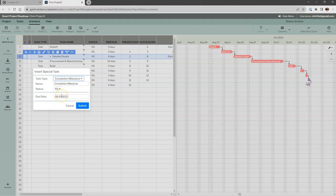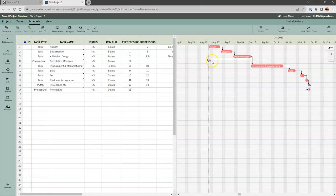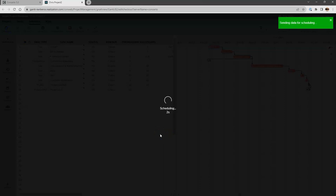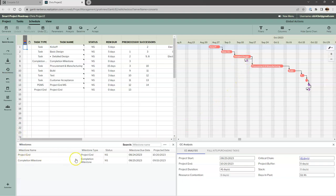I want to place a milestone after the detailed design task. I've clicked on number three, the detailed design task, and I'll come over here to 'Insert Special Tasks' and select 'Completion Milestone.' We've changed the name to 'completion' — it's called a completion milestone in our software. The due date will be calculated as we run the generate schedule algorithm again, so I'll go ahead and submit.